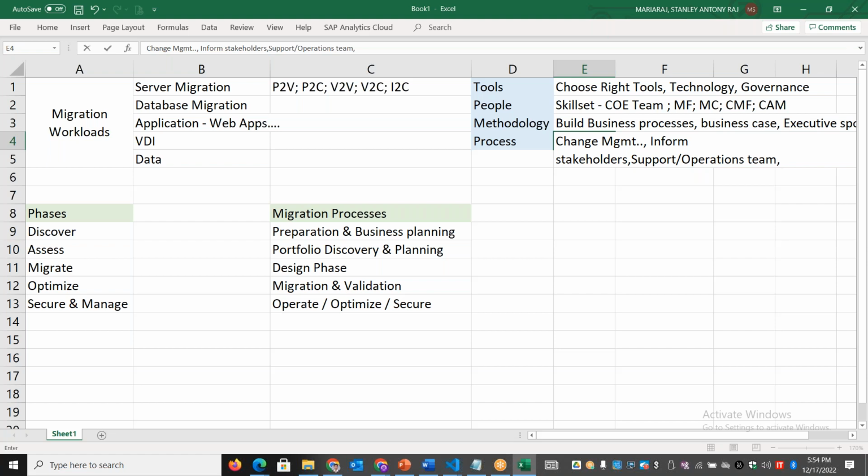They will say these issues were not there in the system, but they have started popping up after or as part of the migration, and it will end up with ownership on the migration team. So we need to look at all the current pending support tickets on that particular system, and decide whether we should do the migration now, or fix that issue first and then do the migration. So we need to do all these checks.